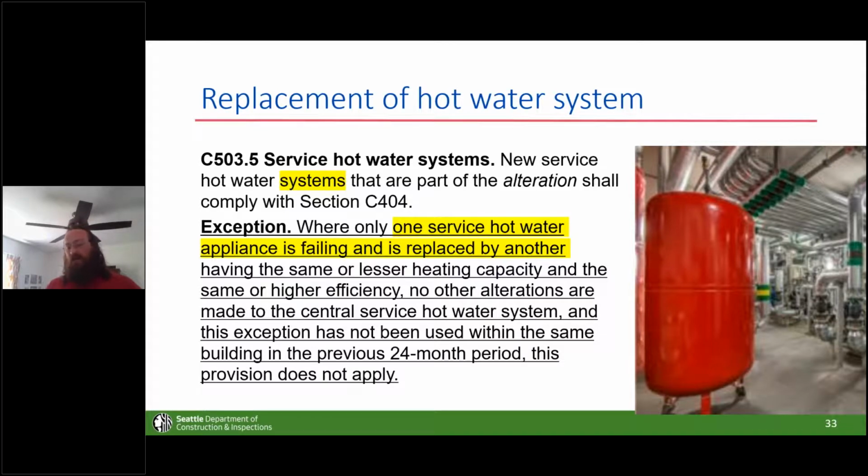When you switch to heat pumps, you're probably talking about running new electrical service to the building. If it was a very gas heavy building, you're talking about nixing outdoor amenity spaces or carving out parking in existing garages. Say your gas boiler plant was on the roof, but you had some parking space down low that you could get rid of. Those existing mains are fed in the opposite direction of where they want to be fed with the new heat pump if it's located down in the garage. So that would involve demo, cost, and probably a potential shutdown, or at least some period of time, unless you ran the systems in parallel as you install them with the other system live. But anyway, it's sort of a bird's nest, and I can't tell you that it's easy.